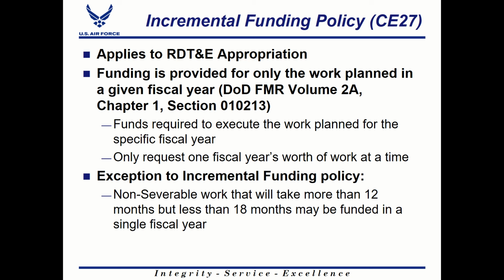for that in one fiscal year instead of having to break it over into 2 fiscal years, because really the thing you want is the prototype, and if you don't fund the whole 16-month effort, then you don't get the prototype, and that kind of defeats the purpose of the work. And again, this is one of those things where it may be funded in a single fiscal year.